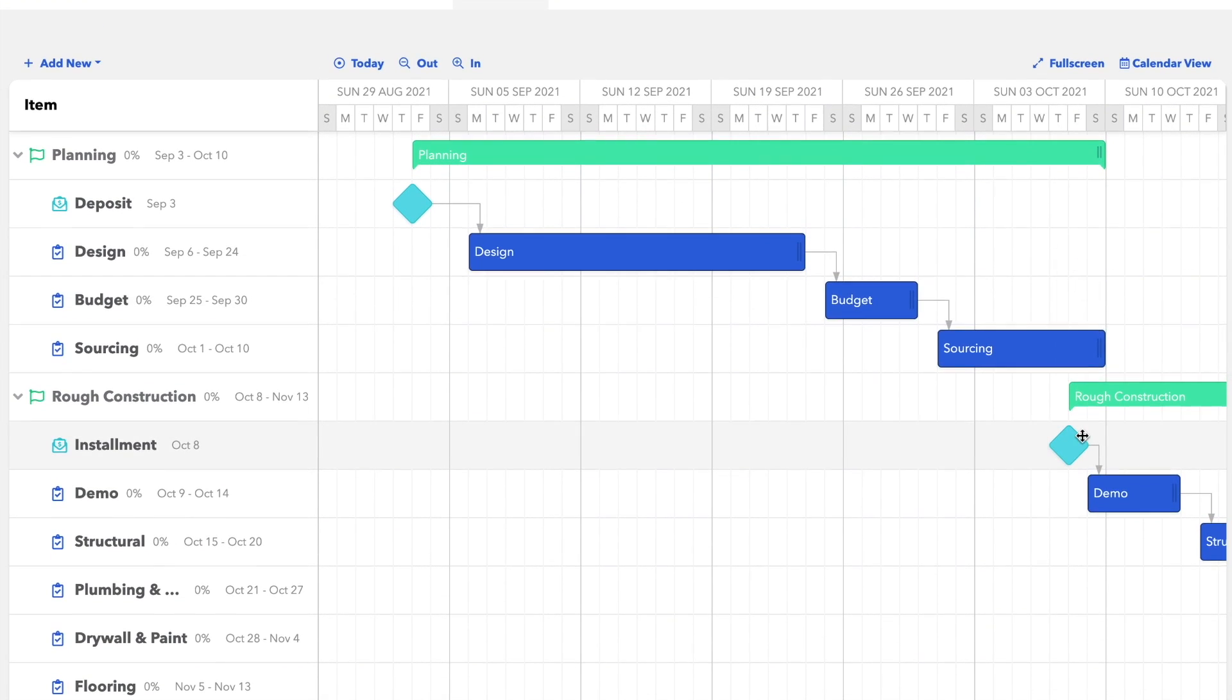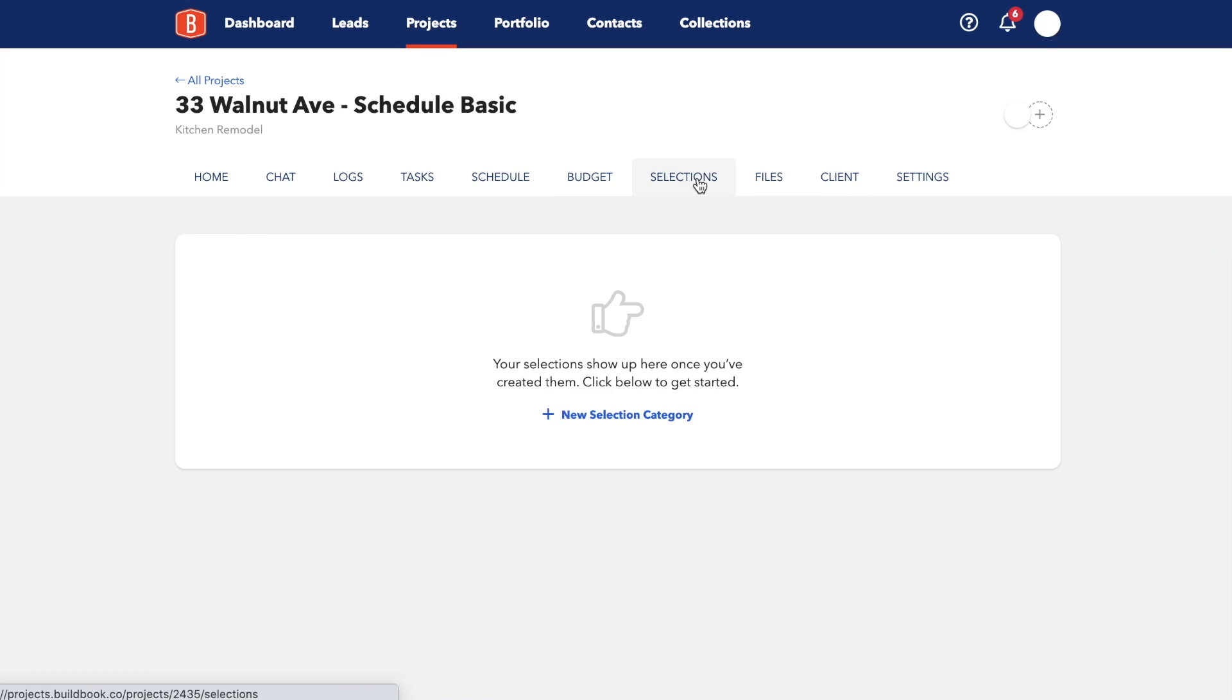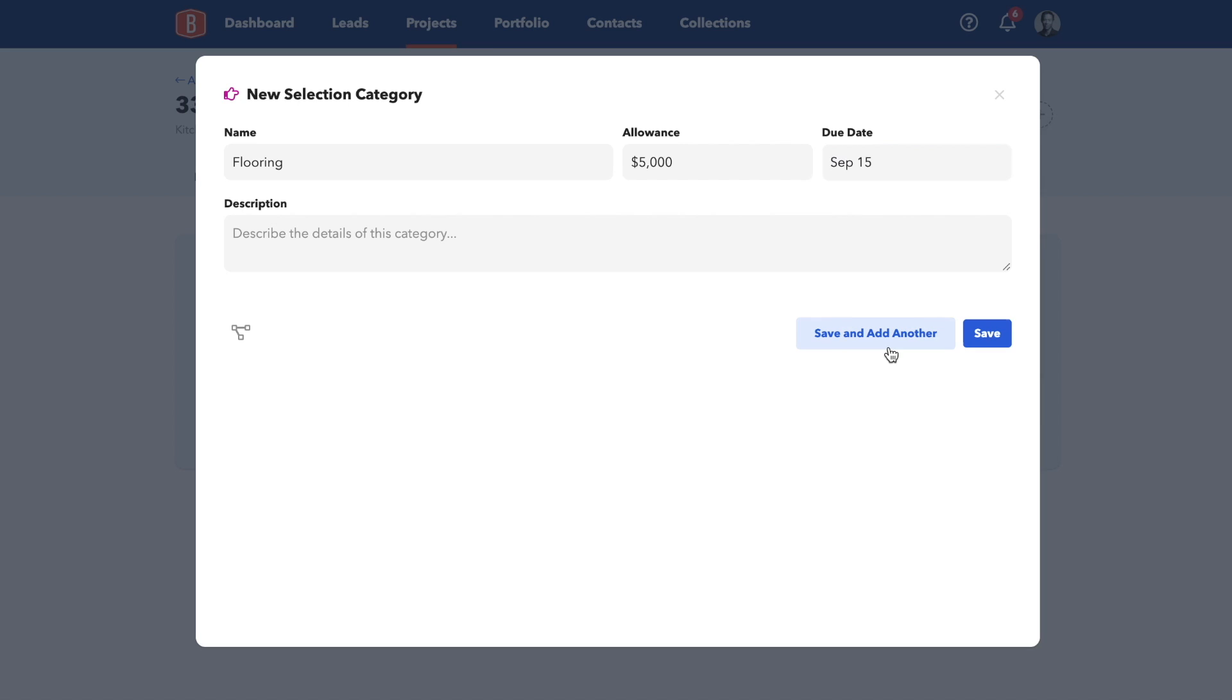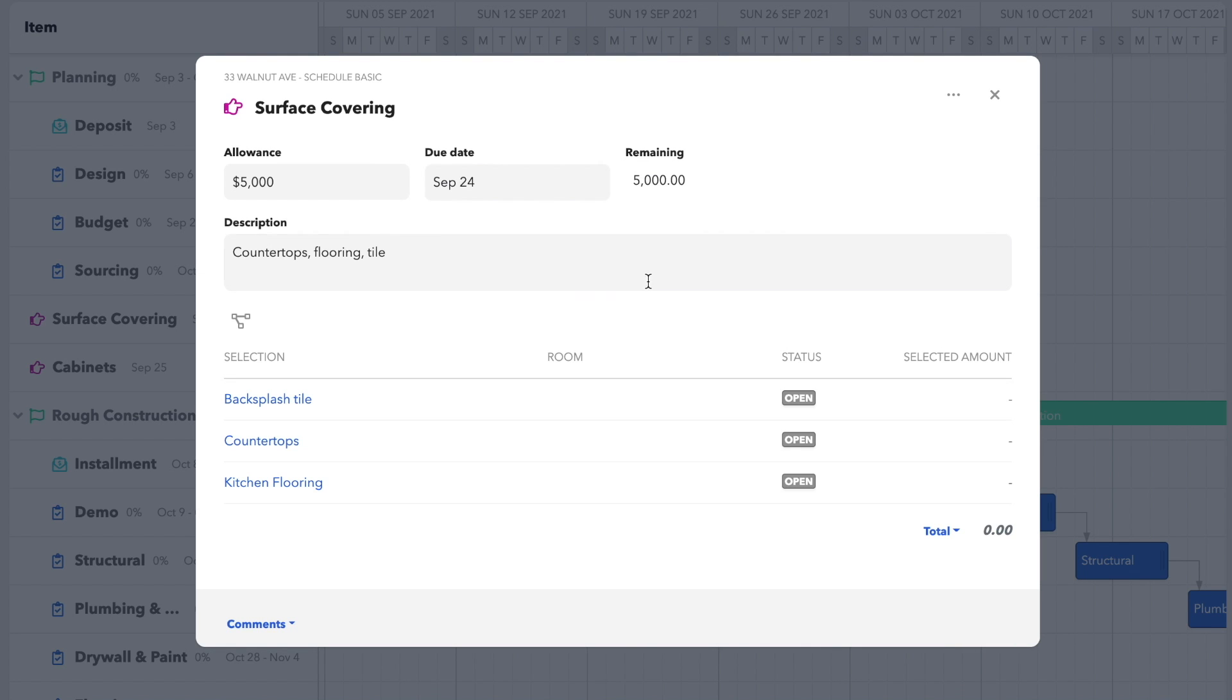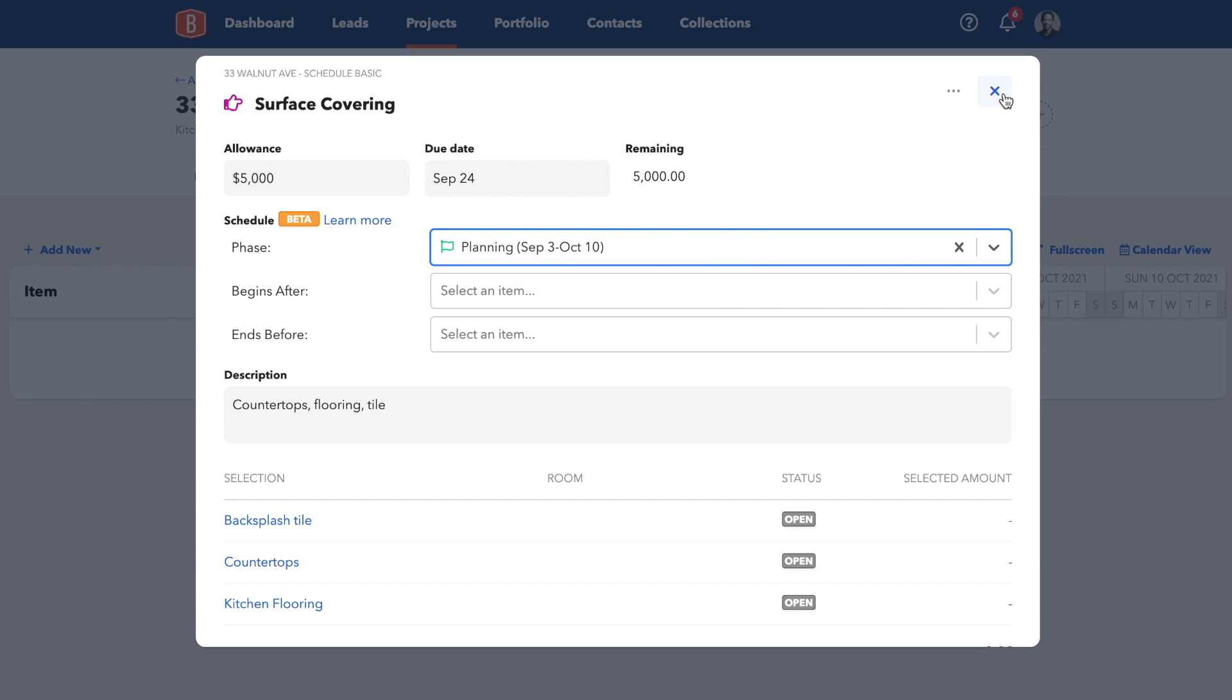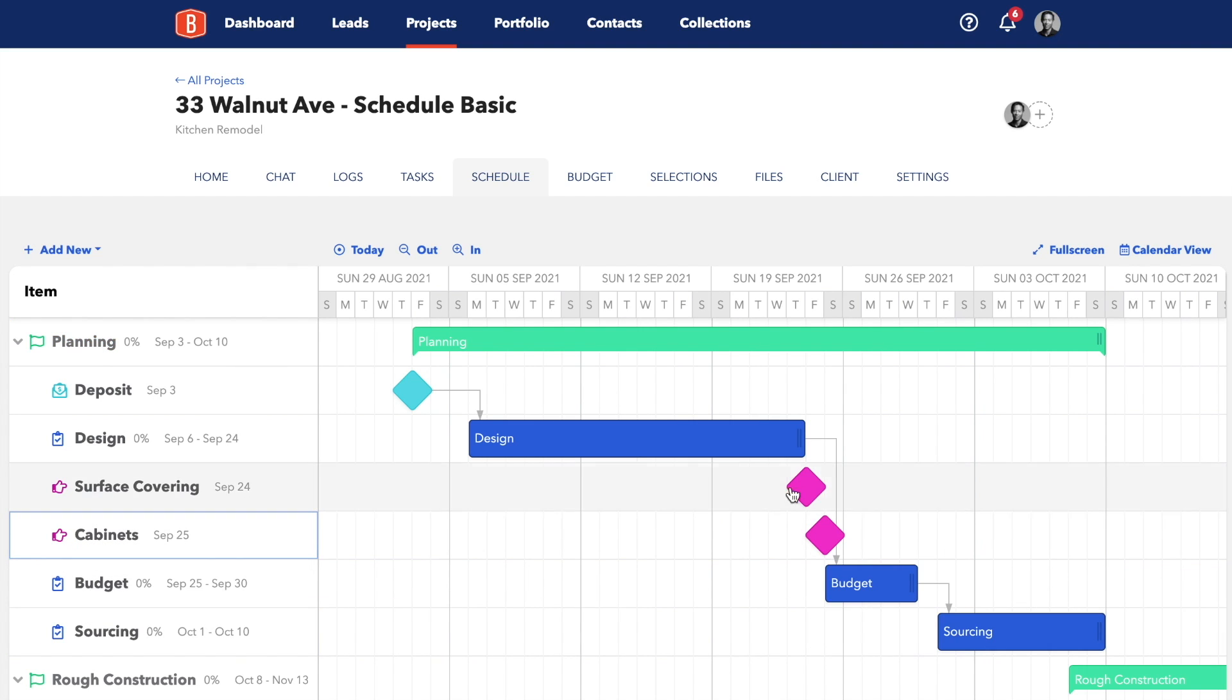Another huge hang-up is waiting for clients to figure out what materials they want to order. And we can even put those items in our schedule. Head to Selections to add some categories and items. I'll set up these selection items as placeholders. So now on our schedule, we've got new elements to move around. I'll add surface covering and cabinets to the planning phase and draw the dependency lines.